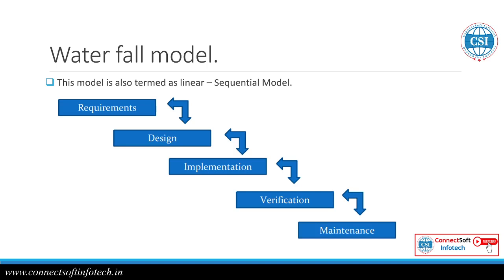So that is known as the iteration. So one iteration and the next iteration, and nth number of iterations can be performed in the incremental model. So we are going to increment the iteration. We are following the repeated stages, that is requirement analysis, designing, coding. So the repetition you are going to perform is known as the increment, that is iteration. Okay, and it takes so much time, because the nth number of iterations happen when the requirement gets changed. Iteration is incremented, right? So each iteration has the analysis, designing, coding, testing phases. Okay, this is about the incremental model.